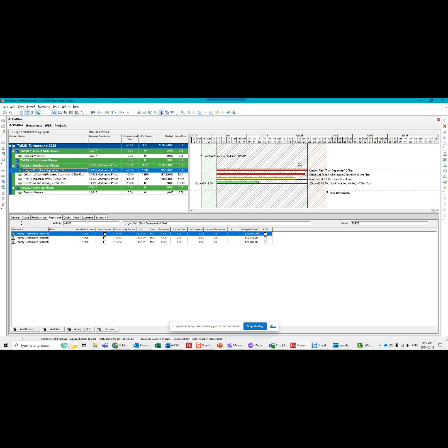In this case, I have my mechanical system, and within this mechanical system, I have a longest path. Now, remember, longest path could be critical or non critical. For example, reactor catalyst changeouts are long, but they're not as critical as, say, a project could be. So we're setting the longest path as a definition with zero remaining float. And many of you will recognize that critical is also identified as zero float in most projects. Here I'm using it as the longest path and hence the lighter shade of red.